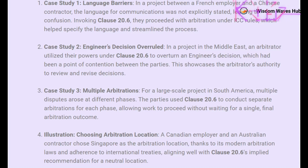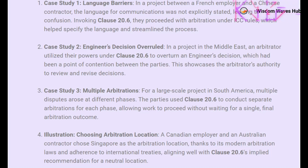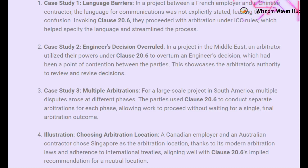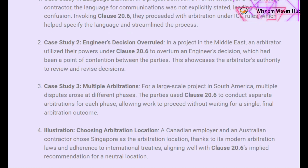For a large-scale project in South America, multiple disputes arose at different phases. The parties used Clause 20.6 to conduct separate arbitrations for each phase, allowing work to proceed without waiting for a single final arbitration outcome. Additionally, a Canadian employer and an Australian contractor chose Singapore as the arbitration location, thanks to its modern arbitration laws and adherence to international treaties — aligning well with Clause 20.6's implied recommendation for a neutral location.